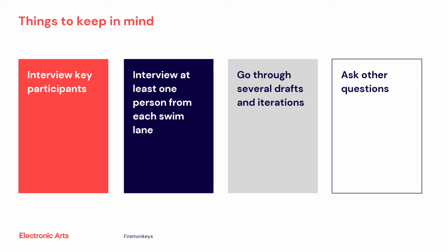While you're drafting up your pipeline, ask other questions. For example, ask people how long it typically takes to move an item on average through their part of the pipeline. You can also ask where things tend to go wrong and what types of things can be done at the outset to prevent those issues. I will frequently ask if there's anything they need before they can get started and how they ensure quality. I'm looking for things like review or validation tasks that can make a pipeline robust. But you can ask anything you'd like to know.